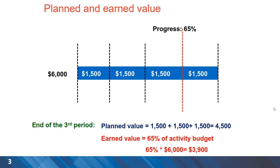In this example you can see that the plan is to spend three quarters, or 75 percent, of the funds by the end of the third period. The actual progress however is only 65 percent, and by multiplying this by the six thousand dollar total budget for the activity, the earned value will be less than the planned value.